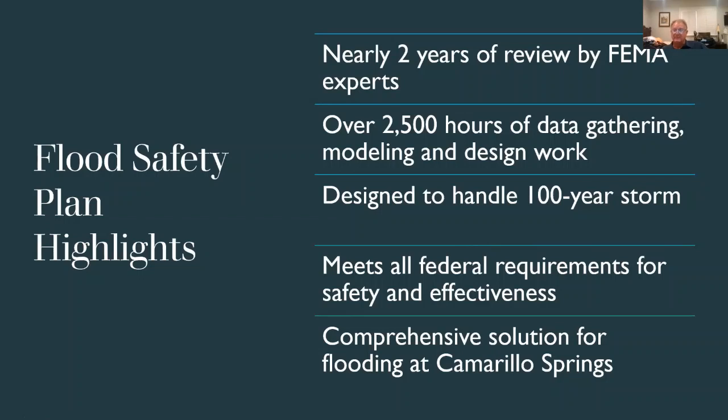Over 2,500 hours of data gathering, modeling, and design work. It's designed to handle a 100-year event, where the pictures that we had from 1983 were a 22-year event. It meets all the federal requirements for safety and effectiveness, and it's a comprehensive solution for flooding at Camarillo Springs.